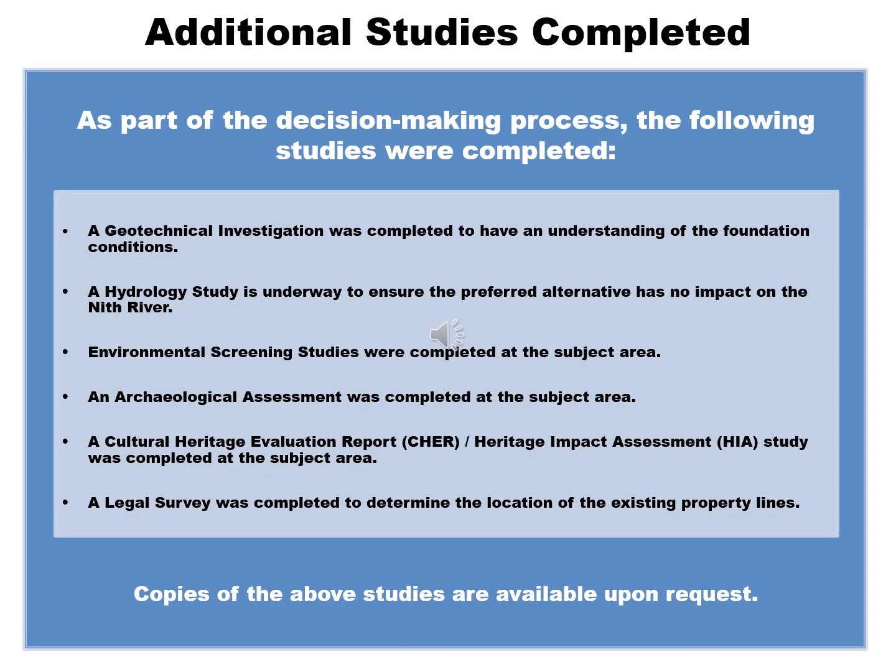Additional studies completed: as part of the decision-making process, the following studies were completed. A geotechnical investigation was completed to understand the foundation conditions. A hydrology study is underway to ensure the preferred alternative has no impact on the Nith River. Environmental screening studies were completed at the subject area. An archaeological assessment was completed at the subject area. A cultural heritage evaluation report (CHER) or heritage impact assessment (HIA) study was completed at the subject area. And finally, a legal survey was completed to determine the location of the existing property lines. Copies of the above studies are available upon request.